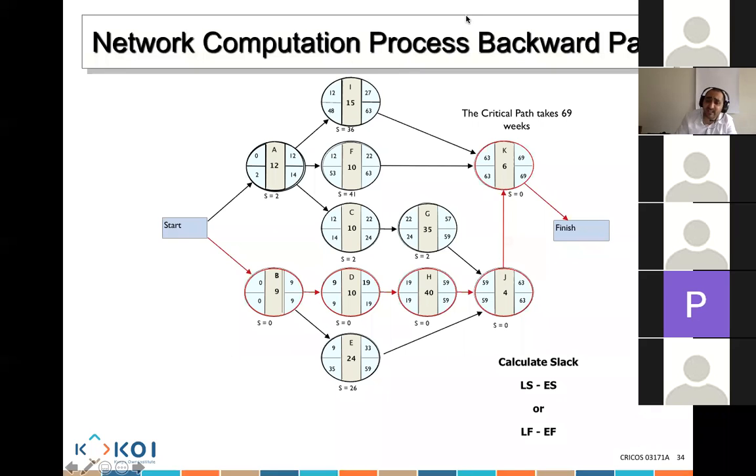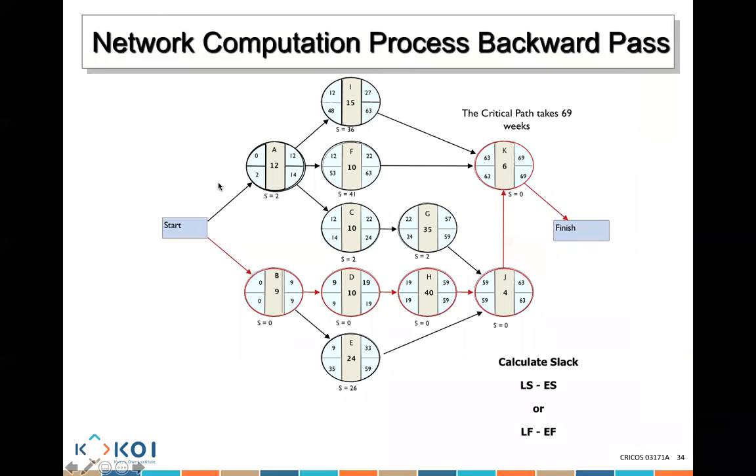Perfect. So any activity that is on the critical path, can I delay an activity on the critical path? Yes or no? No. Why no? There is no slack time. If this increased to 60, this will have to start after 60, and this will have to finish after 70. You will delay your project duration.